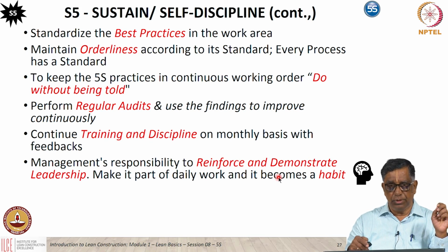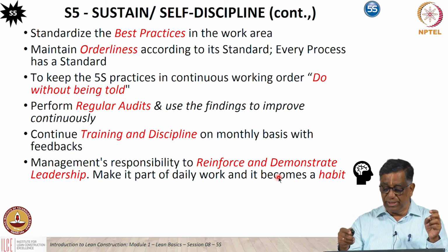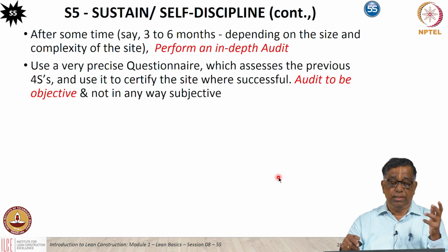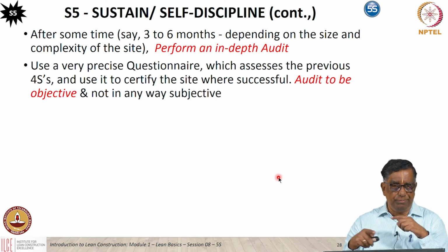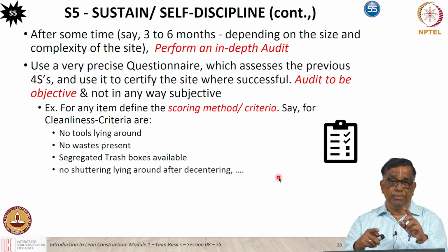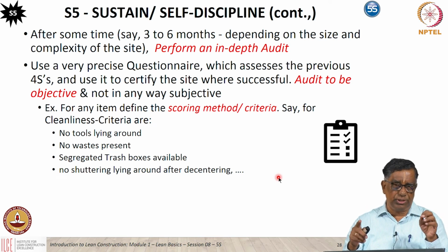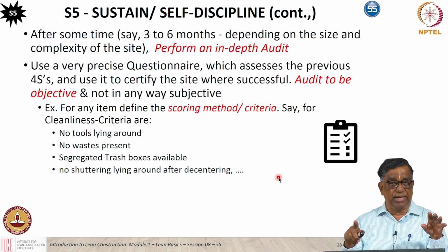And ultimately, it's all a matter of leadership. We need to keep reinforcing, we need to keep demonstrating leadership, ultimately till it becomes a matter of habit. And once it becomes a matter of practice like this, maybe after about 3 to 6 months' time, we can get a major audit done, preferably by somebody from outside the site. And there, we have a very precise questionnaire. Like I said, we need to have a standard method of understanding what is acceptable and what is not acceptable.